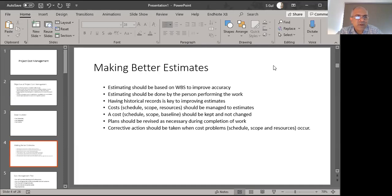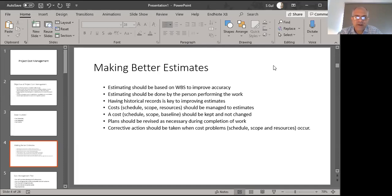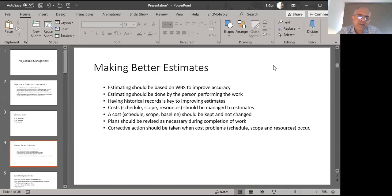To make our estimates better, we use the idea of decomposing the project — overcoming complexity by breaking it into smaller pieces. We created a Work Breakdown Structure (WBS) in the scope area, breaking the project into smaller deliverables, and those deliverables were broken down to a level where they became assignable — decomposed at the product level and then at the process level as work packages.